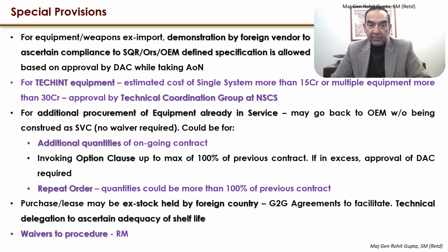They are empowered. For additional procurement of the equipment already in service, which are already inducted in service and they are available, and we want to buy additional equipment, we can go back to the OEM without being construed as a single vendor case. So no waiver is required for this. We could go directly back to the OEM itself.